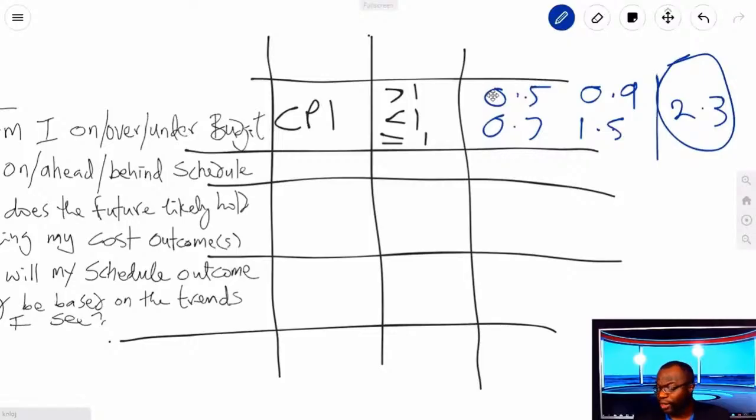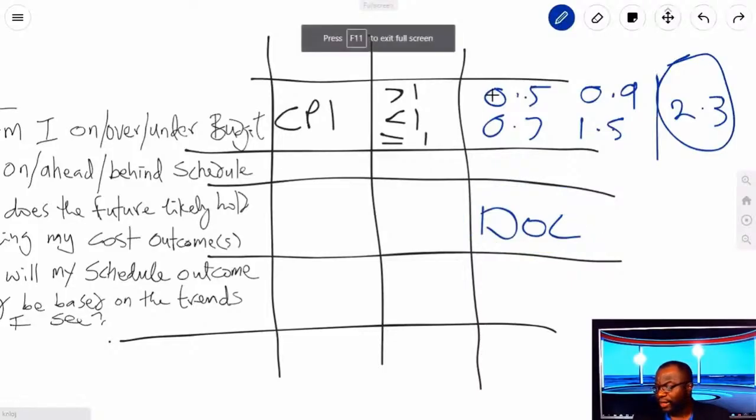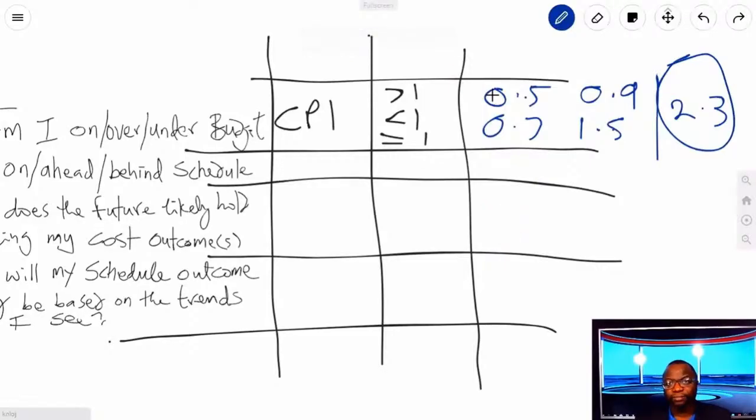And there's some great work that was done by the Department of Energy, DOE. Maybe before the end of the session, I'll go look for those DOE files that are online and see if I can direct you to them. But there are different ways you can claim earned value. And one of the ways you can claim earned value is by planning out what you need to do over a particular time period and taking account for the hours you work, like in a service contract. So that's how management knew there's definitely something up. This is a level of effort, and there's no way we could have been that good in terms of our